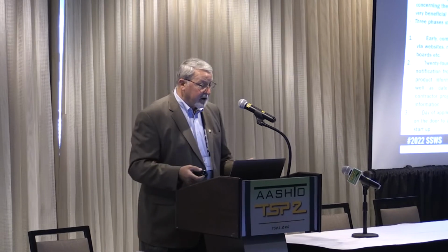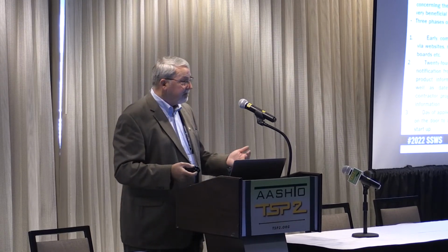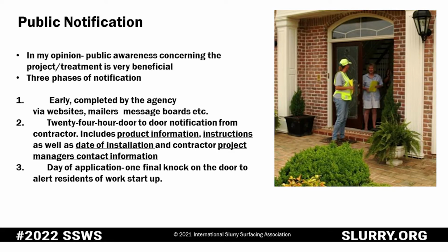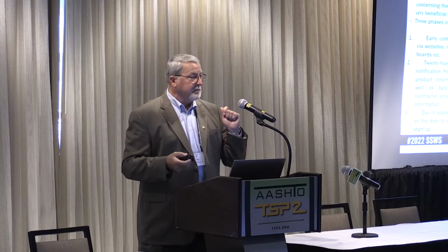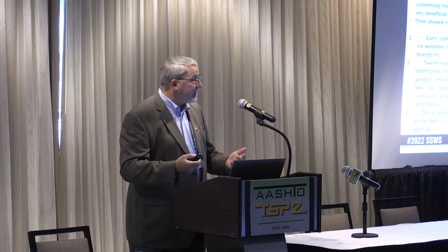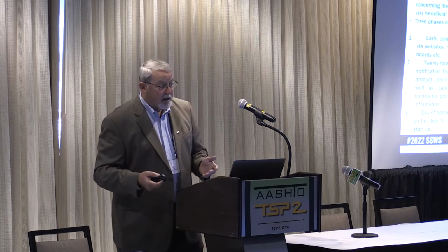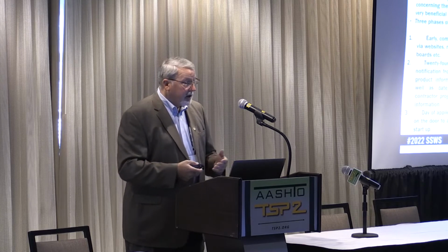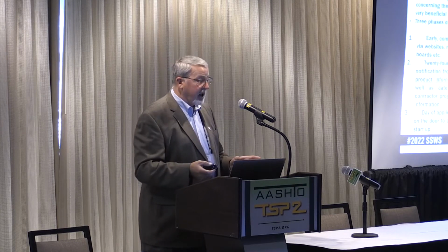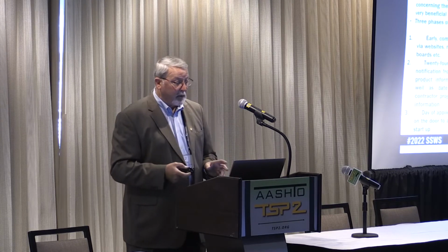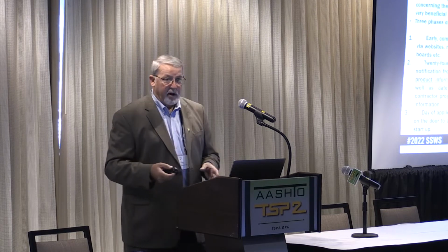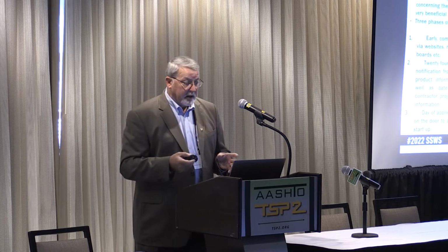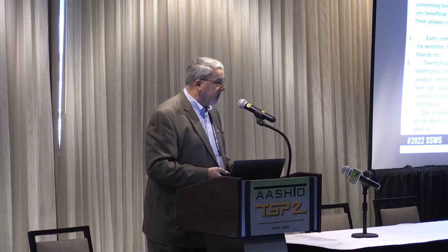And the final stage of that notification is the day of application. Knock on that door, remind them, hey, you knew we were coming, we're getting ready to start. If you're planning on leaving, now may be a good time. And this robust approach of public notification is fantastic. I mean, it works great. We do it. I can't tell you the hours that we spend notifying the public, but it really pays off big dividends in doing so.